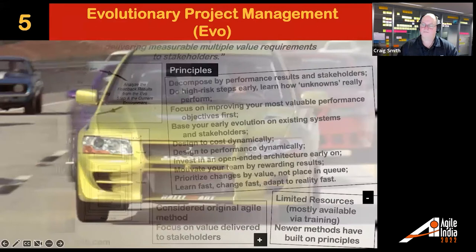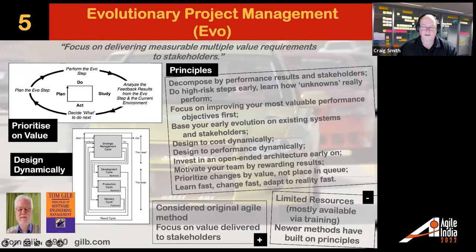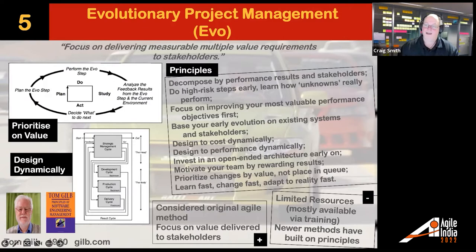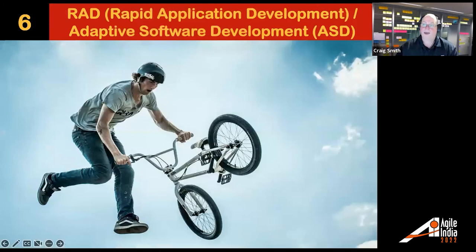EVO is probably the oldest technique, going back to Tom Gilb in the 1960s — we could consider this the start of Agile. He talked about Plan, Do, Study, Act, and had principles like breaking things down, doing high-risk things early, and open-ended architecture. Remember, this was the 1960s through the 1980s. A lot of newer methods are built on these principles. If you want to look back at how this all started, go take a look at EVO.